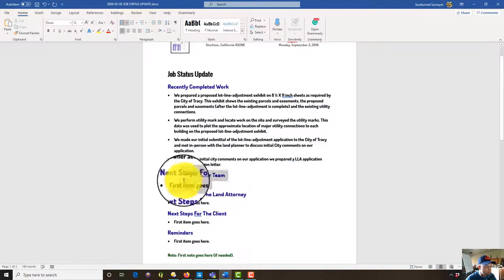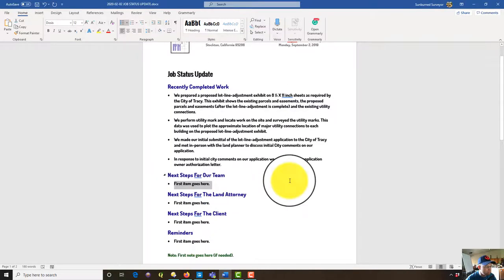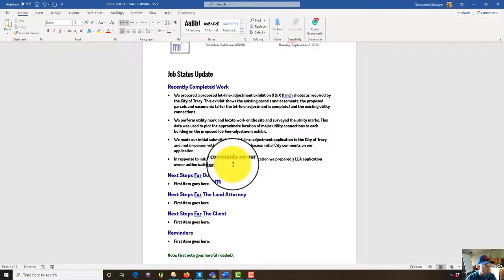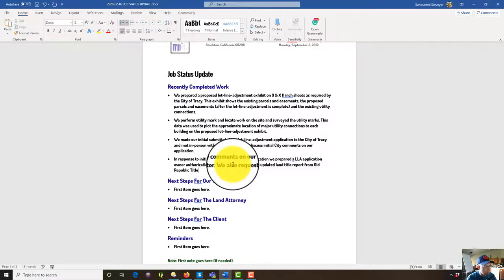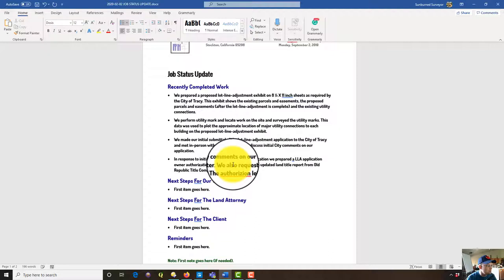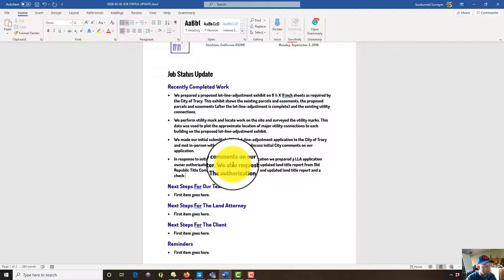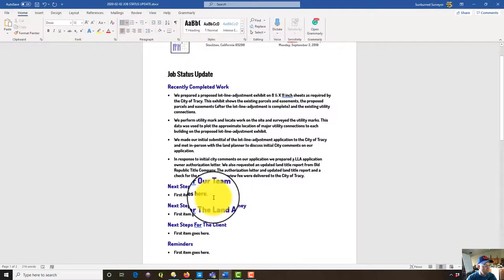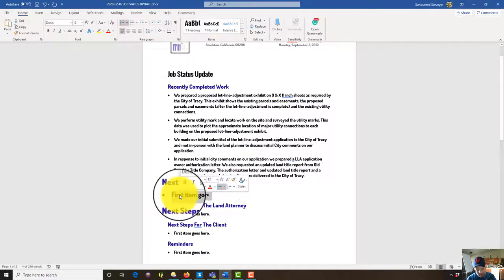Okay. So next steps for our team. Let's see. There's a couple other things we did. We also requested an updated land title report from Old Republic title company.